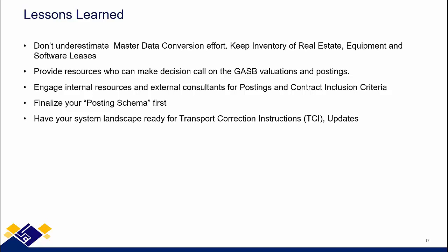We also need the basis and the security teams in the beginning. We have the TCI. TCI stands for Transport Correction Instructions. It's basically a big OSS note, almost as good as a support pack, only for the REFX or CLM module that we need to implement. So we should have that system landscape ready and updated. We have done many implementations, gone through all these pains, and been on a learning curve for the last 5 years, and we can help reduce the pain in the implementation for all this roadmap.